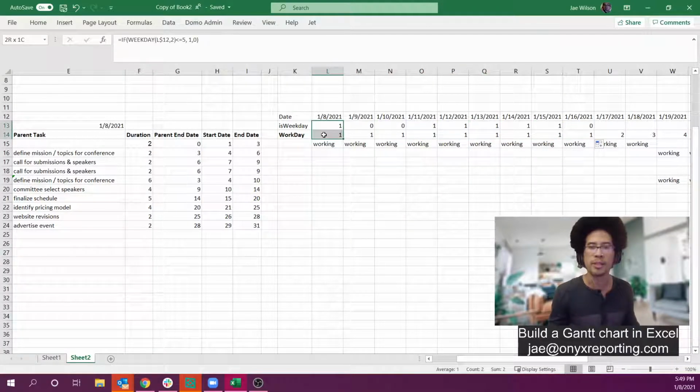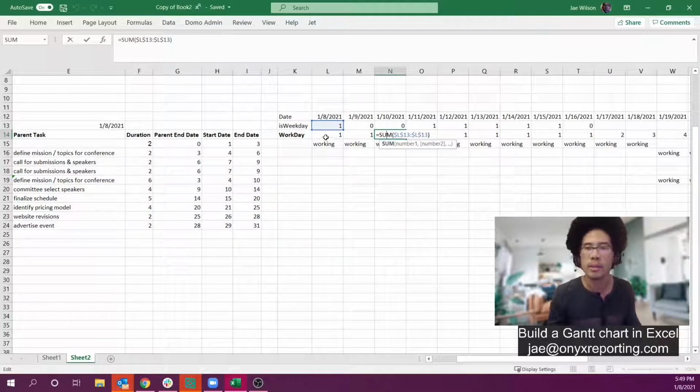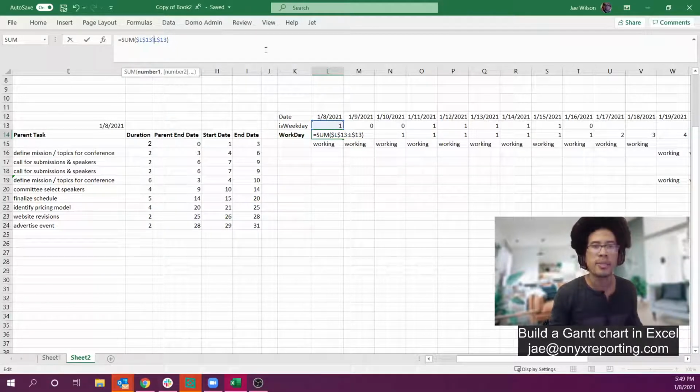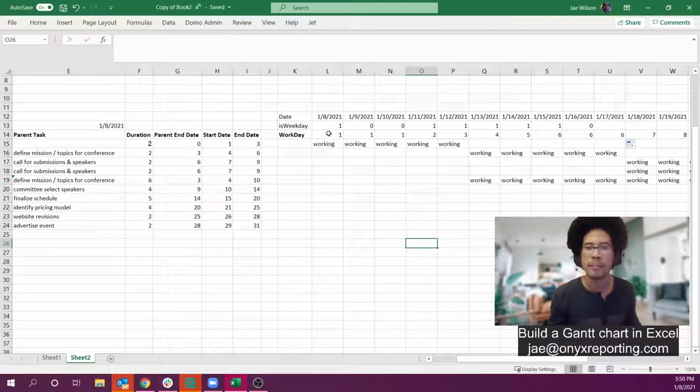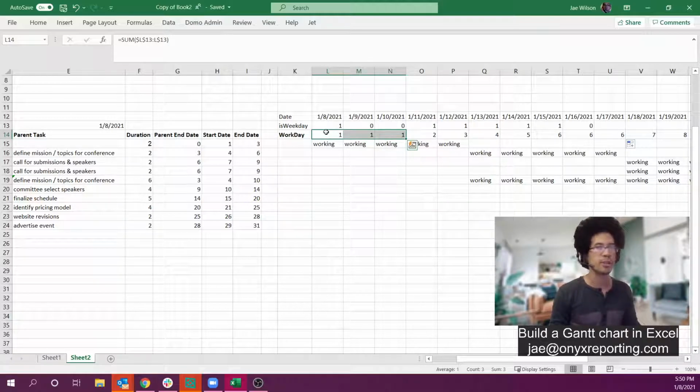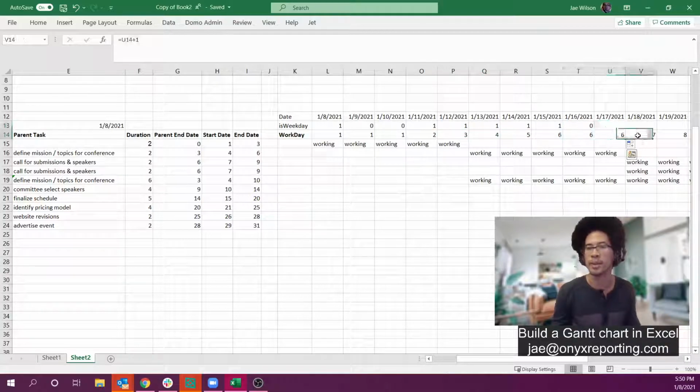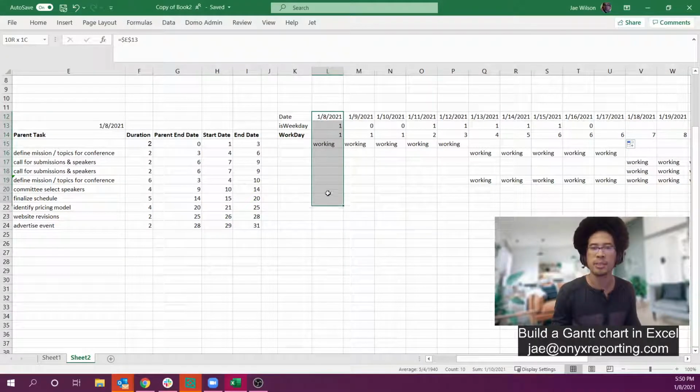Okay, so here's one. Oh, what did you do wrong? Oh man, really struggling with these cell references today. Okay, so here's one. Friday is the first working day. Saturday and Sunday are also part of the first working day because I wasn't working. The second working day is on a Monday, and it increments, and then here, another Saturday-Sunday combination, I wasn't working, then the next Monday will be a 1. Okay, this is working as desired.